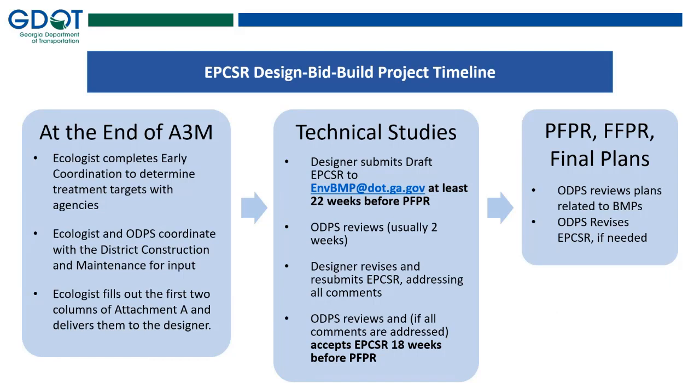So as y'all know, we have two different major project delivery mechanisms at GDOT, design build and design bid build. Design bid build is what we'll start with, DBB. This is the traditional delivery model that GDOT has employed, wherein design happens prior to let, construction happens after let, and ideally those two don't have much overlap, if any. We'll talk about design build in a moment, which operates under a different set of assumptions.